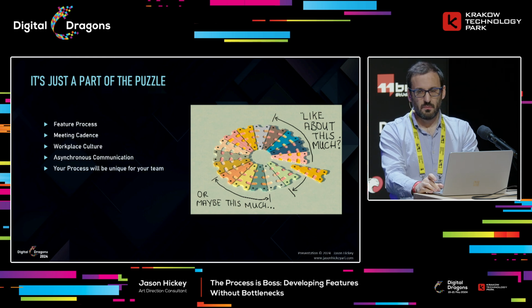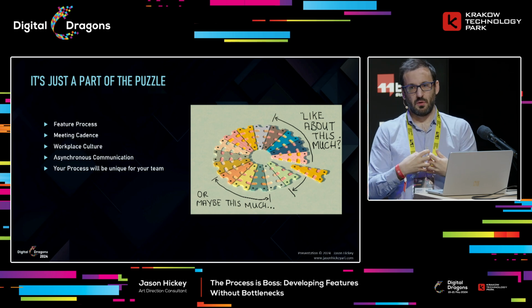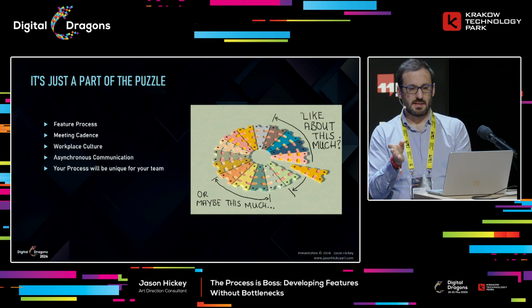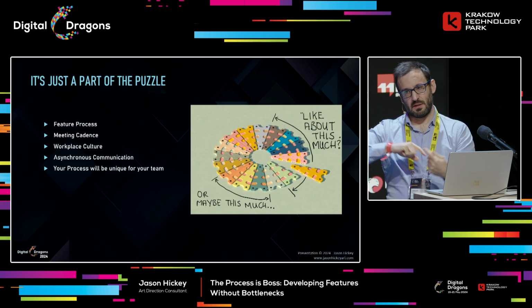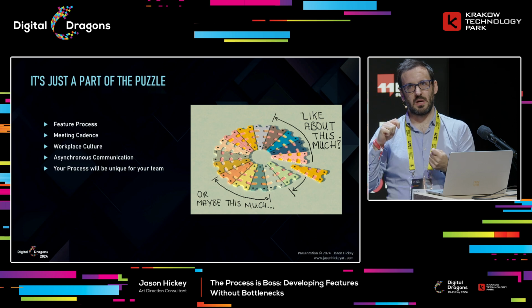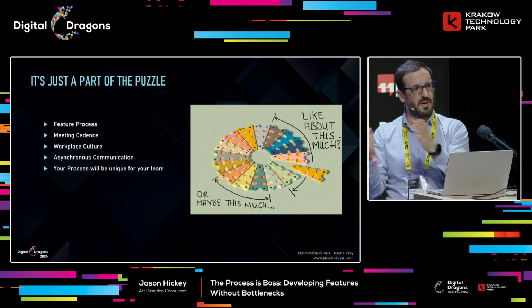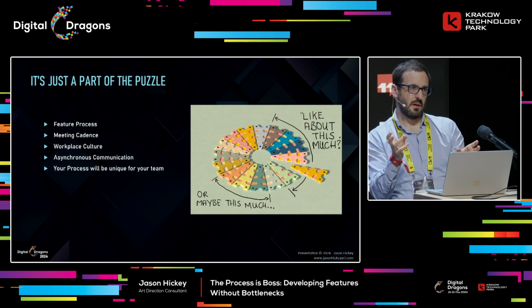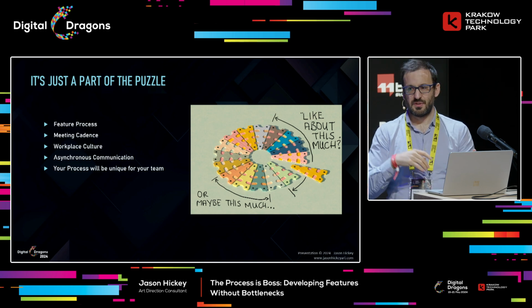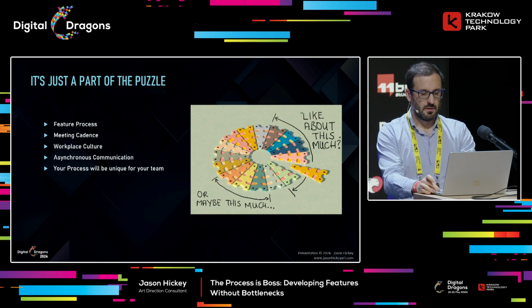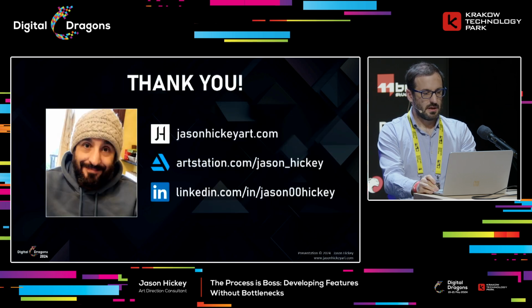One major thing here is to think of your process as a feature of itself. So once you've done the process, you're going to do a retrospective or a post-mortem or whatever and see where it went wrong, where it went right, and then adjust. So on Miles, we started with 6 weeks, and then it went to 7 and 8 weeks on the milestone, then it went to 10 weeks, and then it went back to 8 weeks. It wasn't always the same. We were always shifting just to check. And also different stages of development, like alpha versus pre-pro, things work differently. So just constantly evaluate.